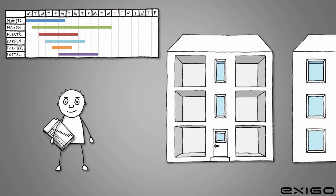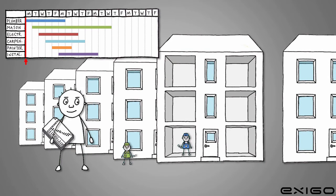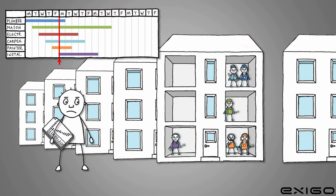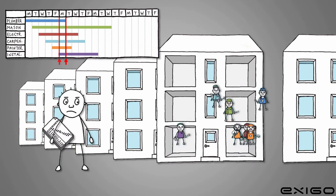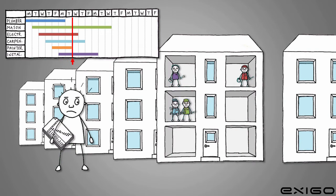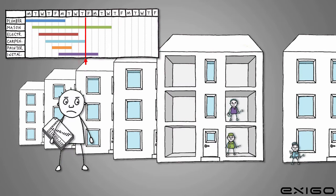It's hard for John to see if he has a good schedule with only the traditional Gantt chart-based scheduling, with the consequences only being confirmed when the work has started. The results are often that workmen begin working in random locations wherever there is room for it. It can end up with days where the construction site is too crowded, and days where the locations are partly empty.